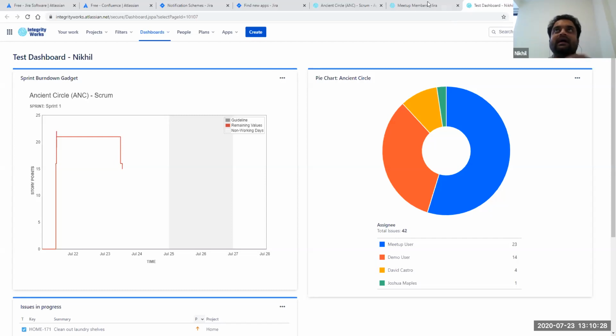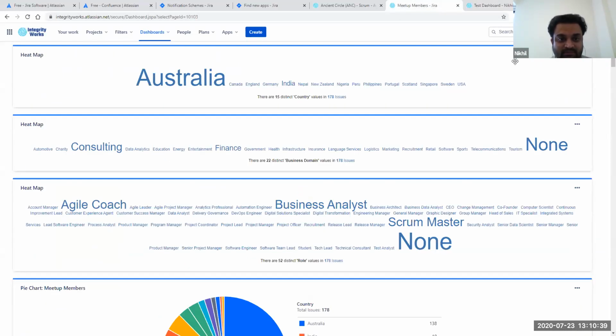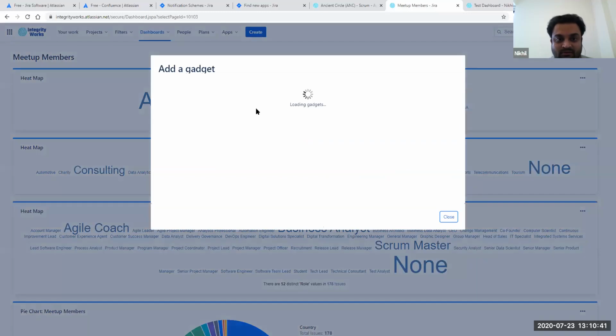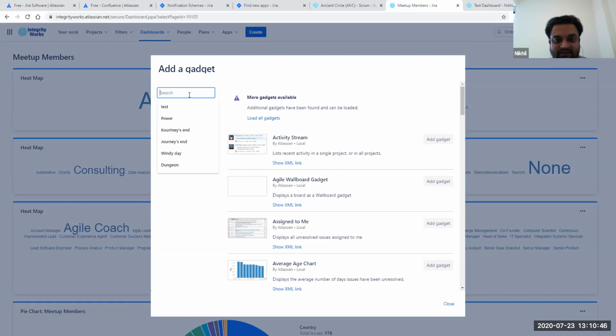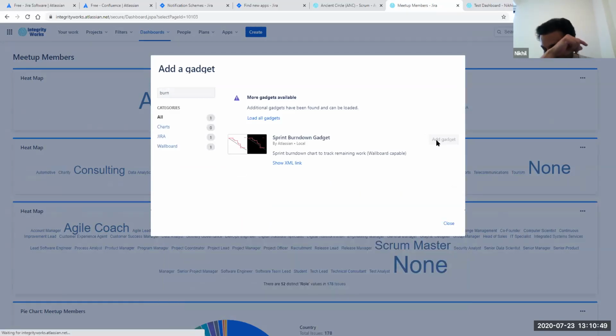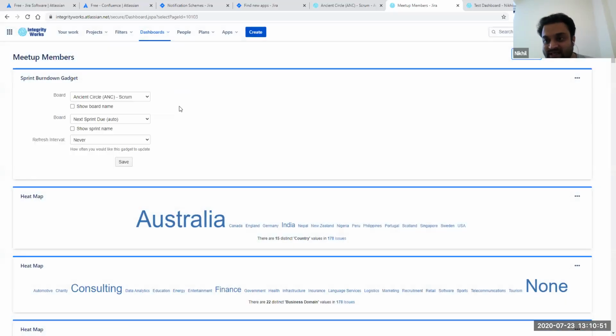I added a project sprint and never to refresh. So I added this gadget. Okay, so it gave me the configuration, which project, Asian project, and then I selected which sprint, and then I selected when it should be refreshed. I said never, and then I clicked on OK. So basically, I got it right now that if you go to board settings and then you change that estimation from that second option to none, then it changes here basically. So you can have only two things, like remaining time estimation versus time, or story points versus time.